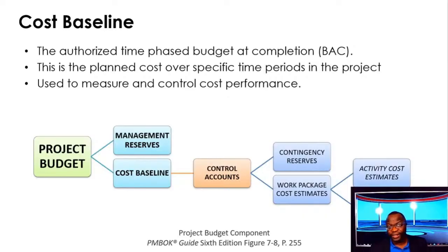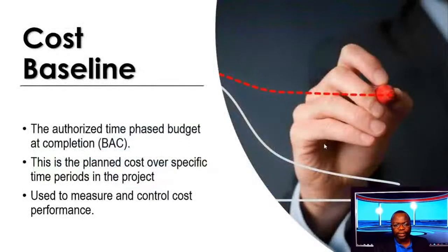The BAC is used as a basis for measuring earned value across the entire project, and it's the same as your cost baseline, okay? So do you have any questions about this stuff I just shared? Questions, comments, or concerns? If you have no questions, comments, or concerns, then I'm just going to move on ahead to the next section here.